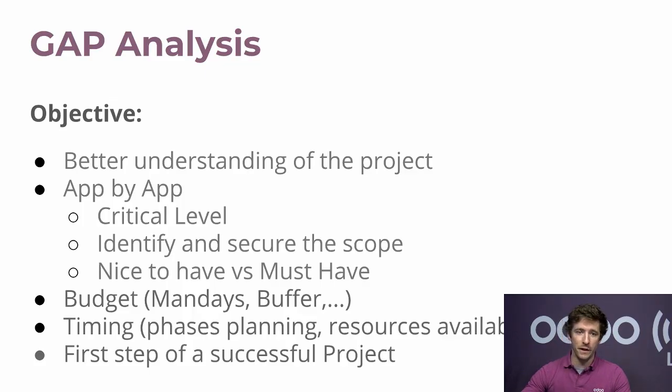During the development or implementation phase, the client notices that they also wanted something else: we never discussed this topic, but it is something important that we should add to our project, and I need it especially to manage my sales. These kinds of add-ons during a project are what will make you fail the project. This is why a gap analysis helps you identify and secure the complete scope of the project.